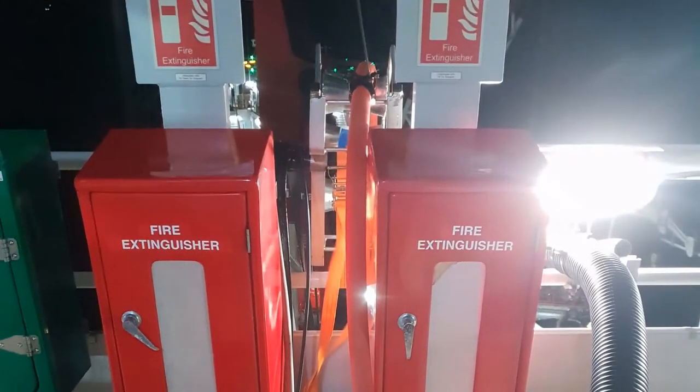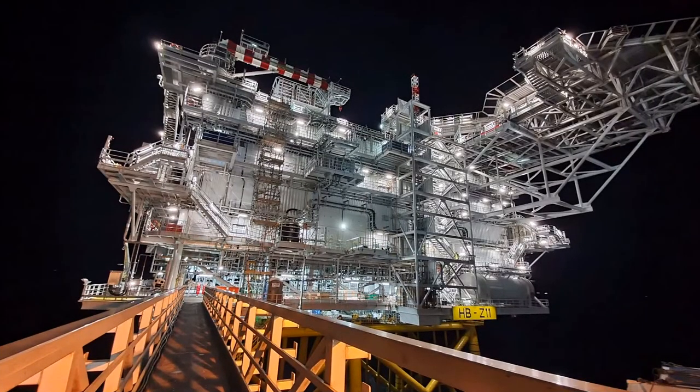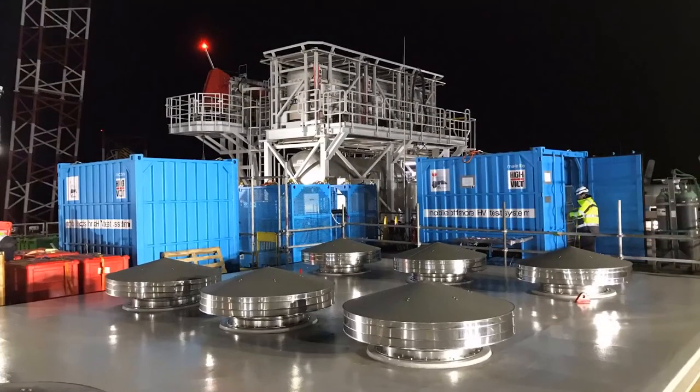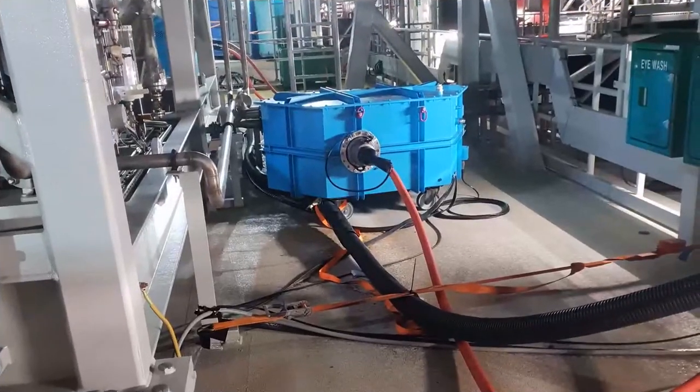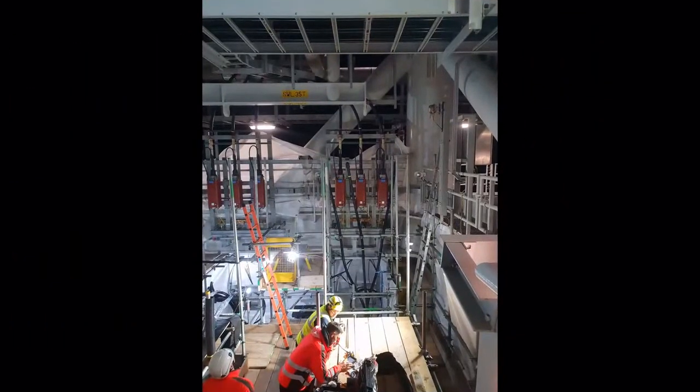stable. You have to imagine that when a topside is installed, several contractors will want to have access to a topside for different parts, such as transformers, high voltage GIS, medium voltage GIS, control and protection, export cable, inter-array cable, topside outfitting, and the most important contractor, scaffolding. Even if all activities have been defined in preliminary stage procedures by all contractors, clash of operations can't be avoided. Main clashes are due to the lifting operations, scaffolding, and room.